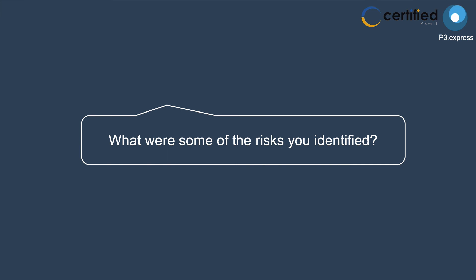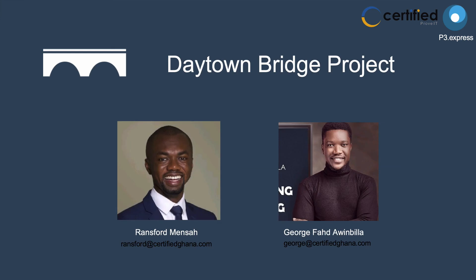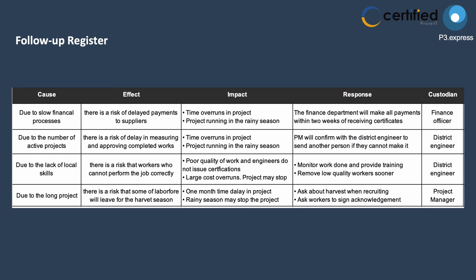Two risk examples: First, due to slow financial processes, there is a risk of delayed payments to suppliers, which could cause time overruns and push the project into the rainy season. The response is that the financial department will make all payments within two weeks of receiving certifications, with the financial officer as custodian to notify relevant stakeholders.